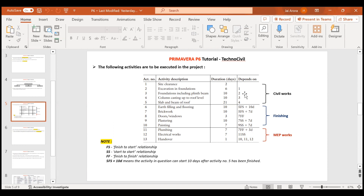First, we'll be talking about the concept. As you can see, the second activity is dependent on the first activity, so the second activity has a predecessor which is your first activity. The predecessor of activity number two is activity number one, or we can say the successor of activity number one is activity number two. While assigning the relationship, we will have to do only one thing — either assign a predecessor to activity number two or assign a successor to activity number one. We'll be going with the simple approach of assigning predecessors.